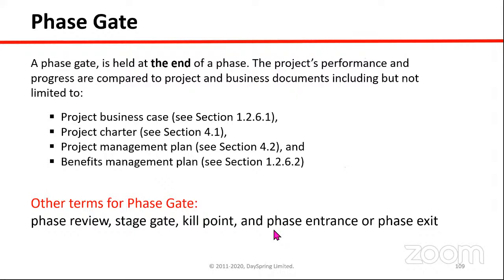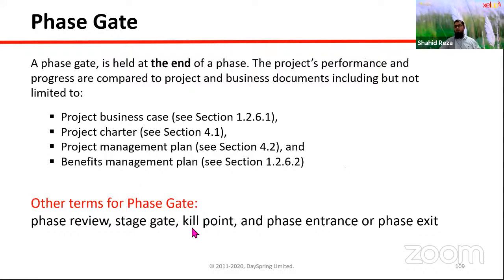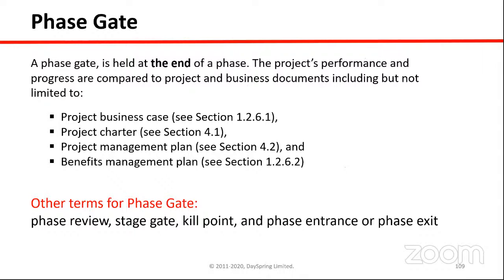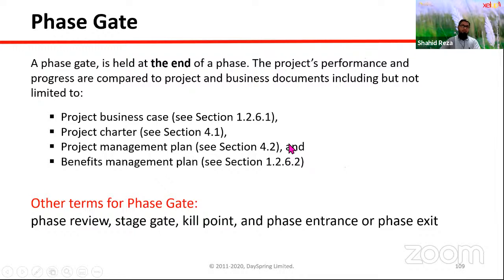Yes, your understanding is clear. It is right. So this is known as kill point because we have to decide whether what we did so far is creating the business value that we have targeted. If not, then management or sponsor can stop or kill the project at that phase. So that's why it is known as kill point.